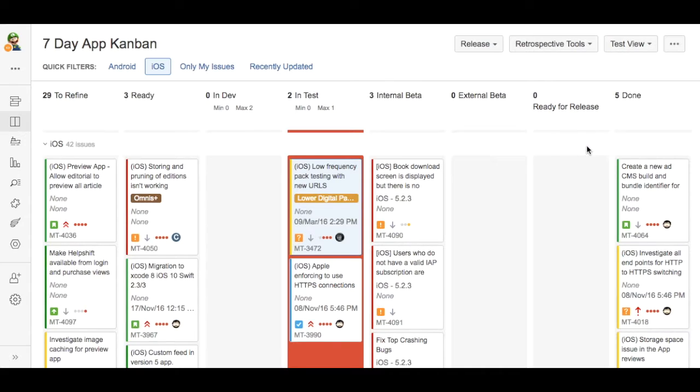In Kanban, done, especially the way we're doing it, is in production, so we keep them on the board until they're actually released. But when they are done and gone live, you want to get them off the board. You do this by doing a release.